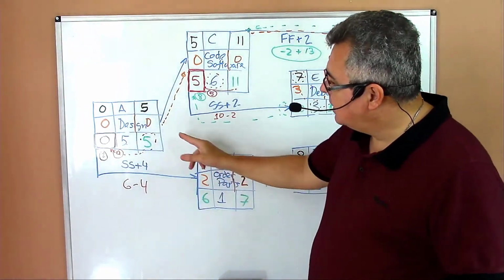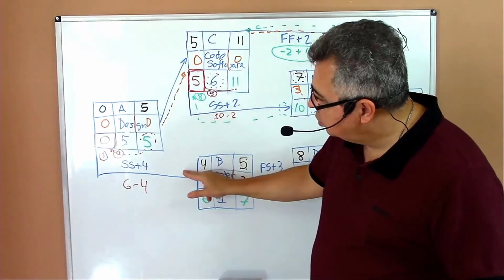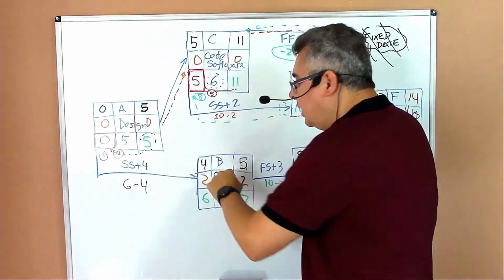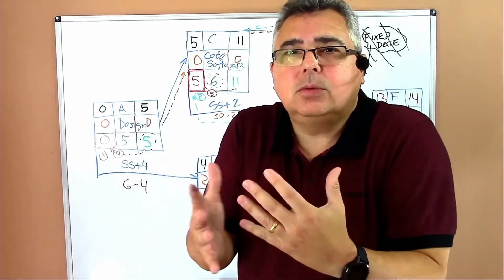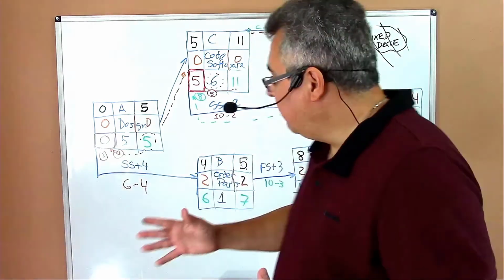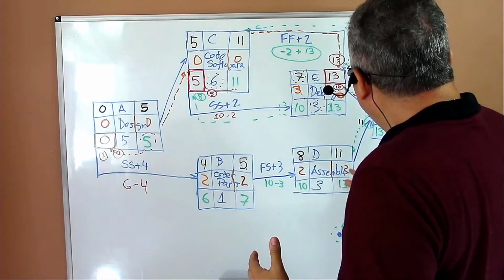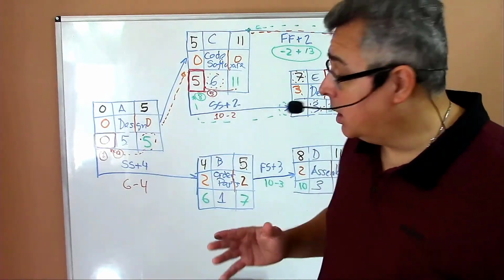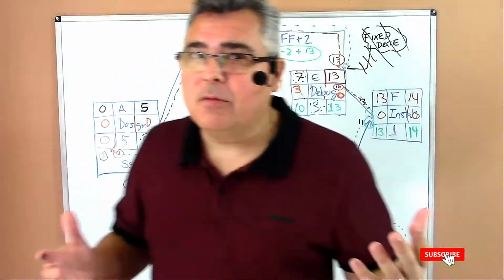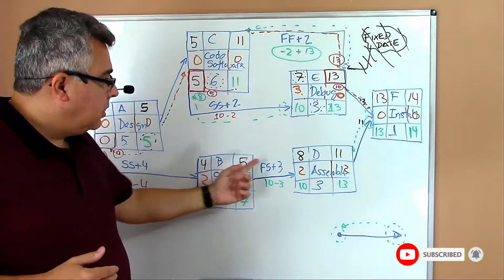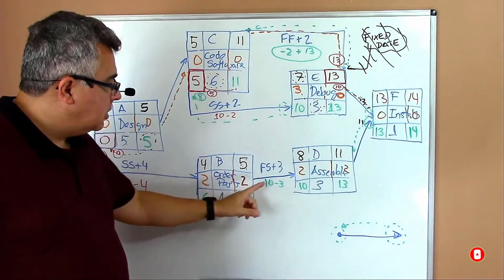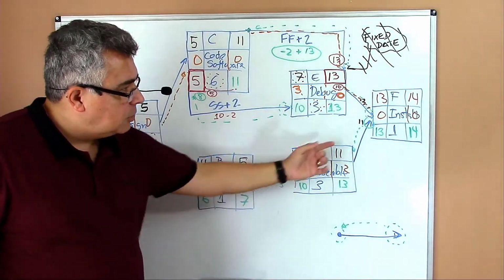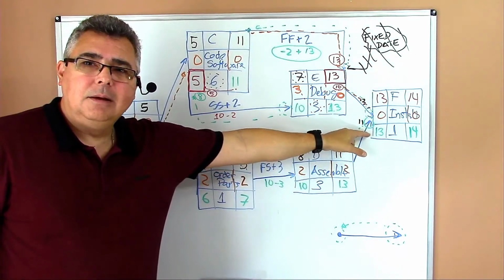And that's the way he decided to move from a finish to start to a start to start with a lag. So the project manager is overlapping activities A and B. He could have decided to keep finish to start. Maybe by keeping finish to start, he would push that a little bit further. Or maybe he saw a risk in the delivery of the materials from activity B and G, where that lag of 3 is probably receiving the material. And if they take 4 days or 5 days, I'll be affecting the final date.